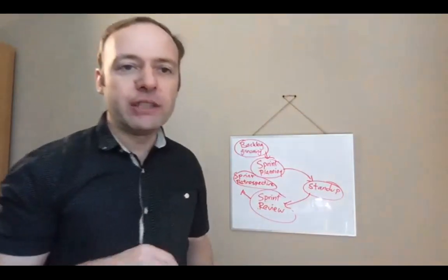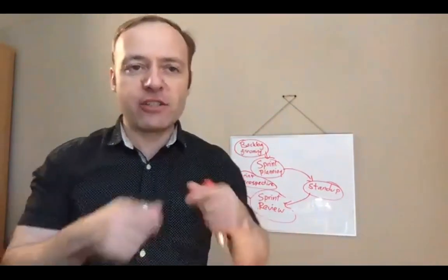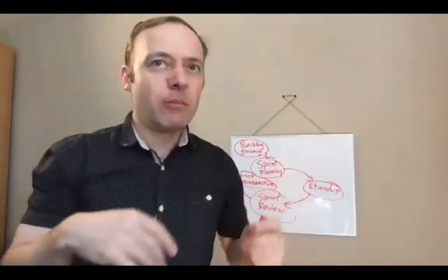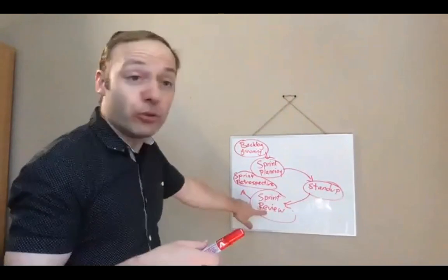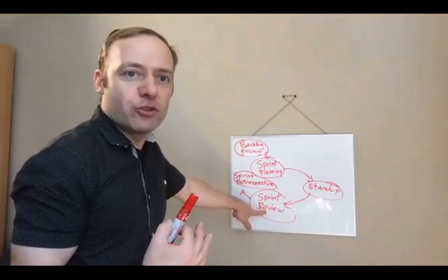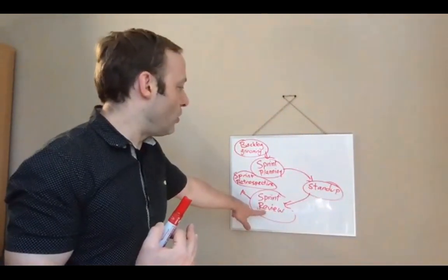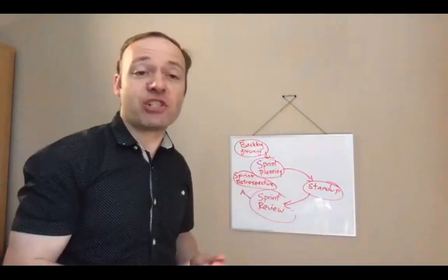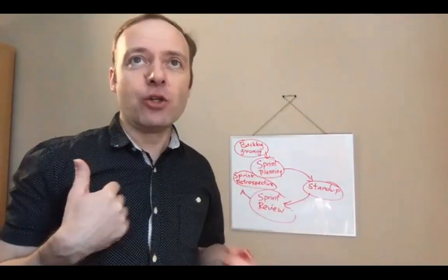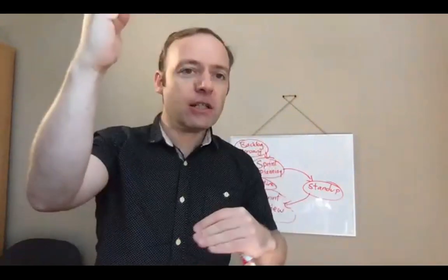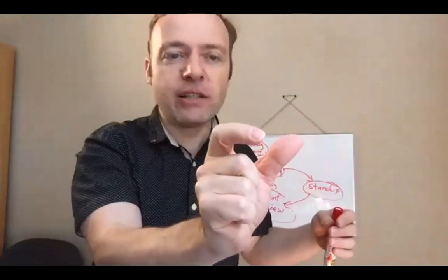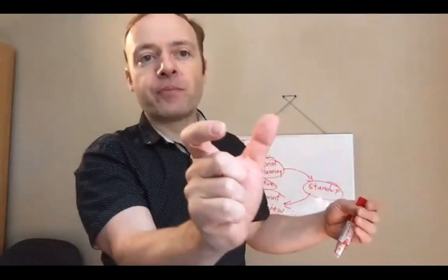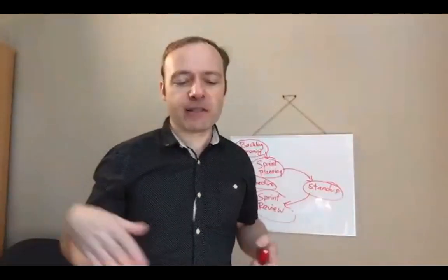I think when you start a new team, maybe you want to go Kanban first. Let's just have a to-do list and go. But then maybe you can add the sprint review meeting, like, oh, what have we done during the last month? And then once you have more stories that are ready, especially as a business analyst, you can plan a whole sprint, maybe a 1 month sprint, or maybe shorter sprints. Start with a 1 week sprint, then do 2 week sprints. Maybe you want to grow to 1 month sprints.